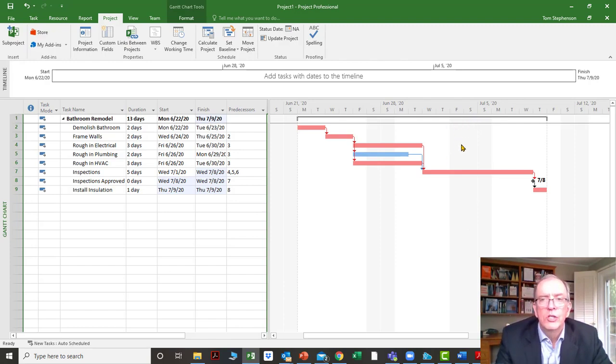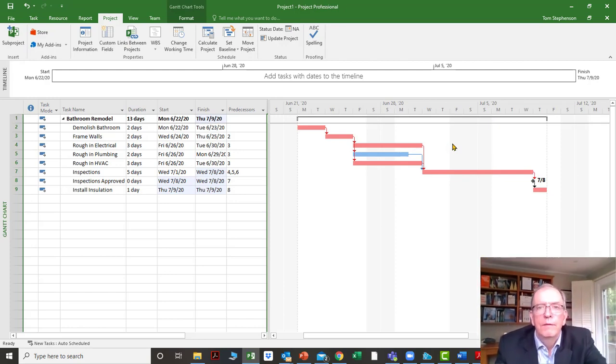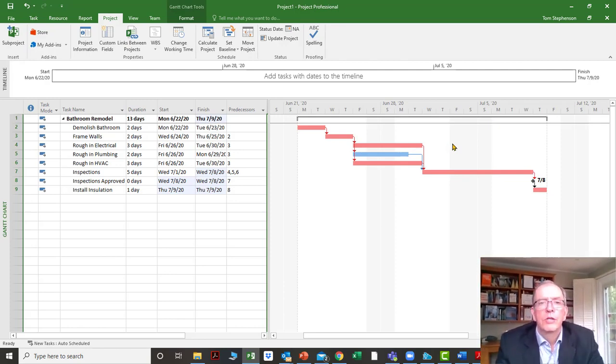You can see the hatching there on your screen. That's showing that it is actually taken off as a holiday. So that would extend your project another day, because you'd have to have another working day. That Friday is no longer a working day.